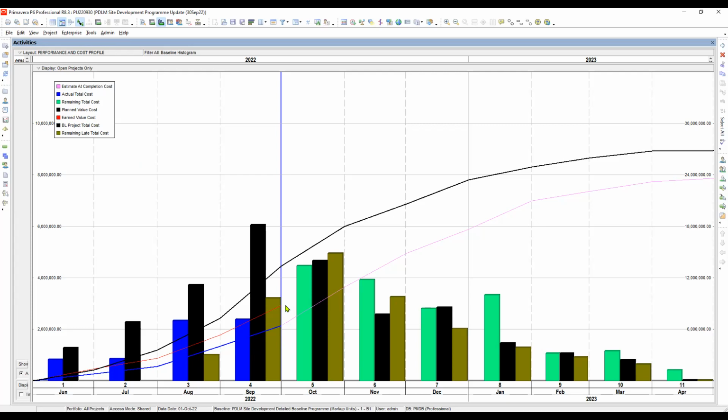If the earned value is higher than the actual cost, that means the CPI is more than 1, which is a good sign of spending. But if the actual is higher than the earned value, you are spending much against your performance. I hope you understand that.